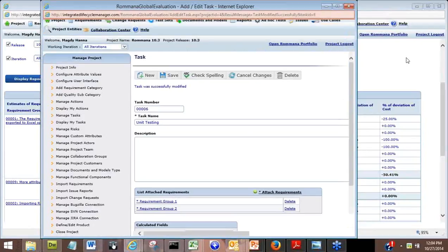So yes, when you have a requirement, you can go into each test within the requirement. If there is a tester who's supposed to develop scenarios, developing scenarios is one of the tasks. The tester has to say, for this requirement, it's going to take me 2 hours, 3 hours, or 4 hours to build the scenarios.